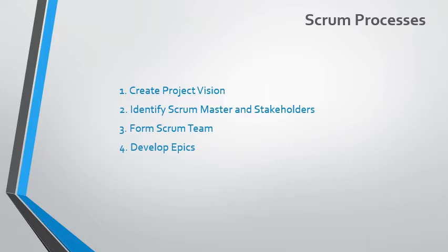So that is the breaking down of the epics, which is part of process 5, create prioritized product backlog. In this process, epics are refined and broken down into user stories. Then backlogs will be prioritized to create a prioritized backlog. The basis of the prioritization will be business value, risk, and dependencies.